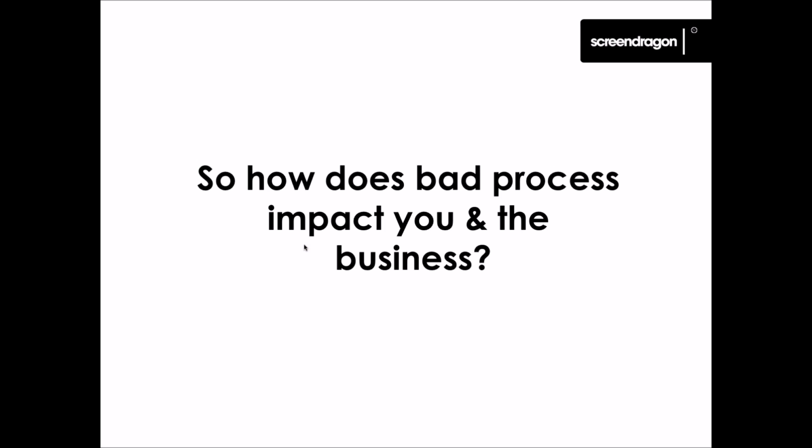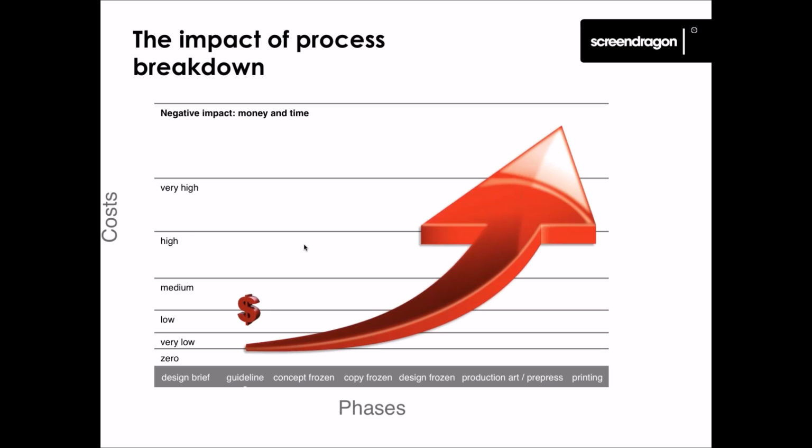So let's say you don't have a process and you haven't got it systemized and don't really know what should be done when. What are the impacts? How can it really hurt your organization? This is just a very provocative slide, and what it's designed to do is to inform you that as you move through a design process, the later that changes are made, perhaps to correct a mistake made earlier in the process, the more expensive it becomes, and it can become extremely expensive.